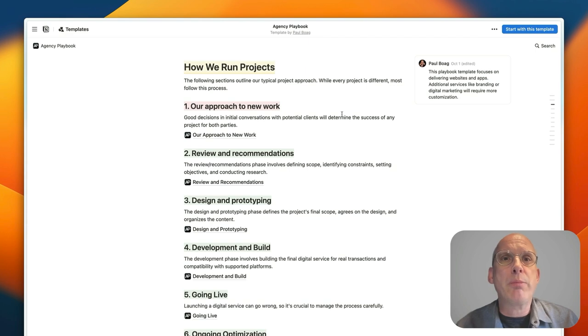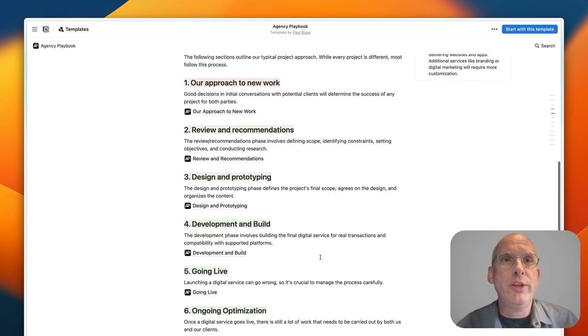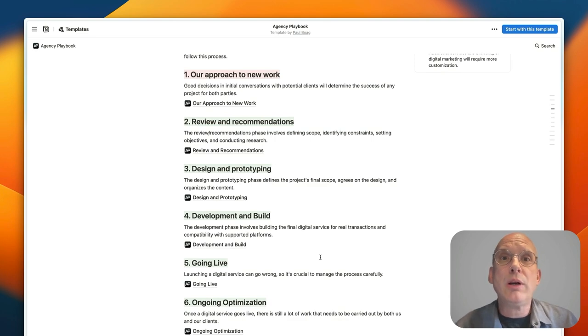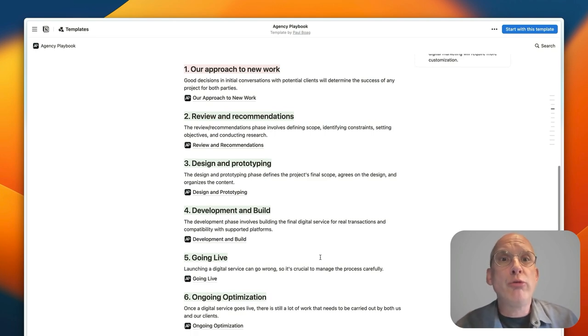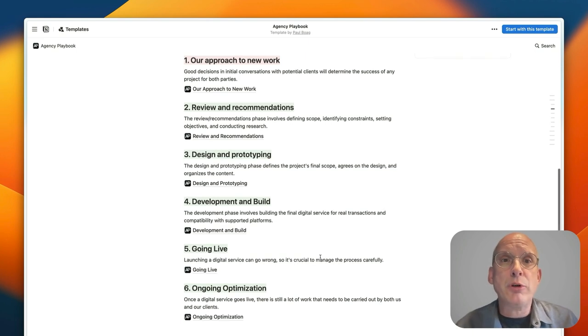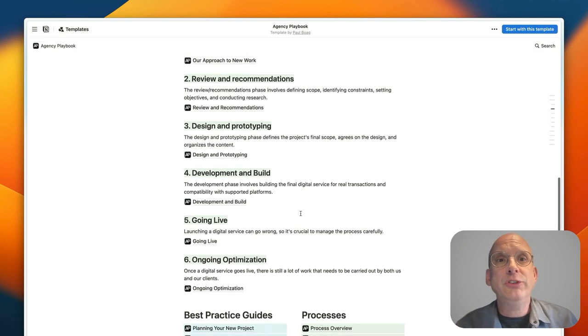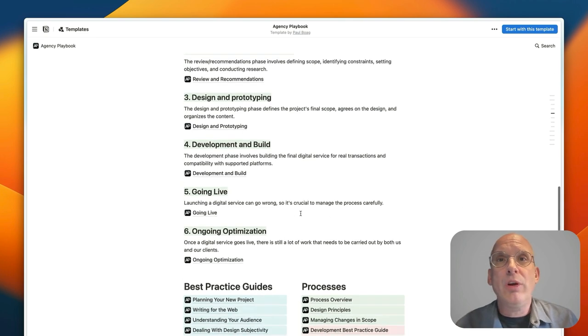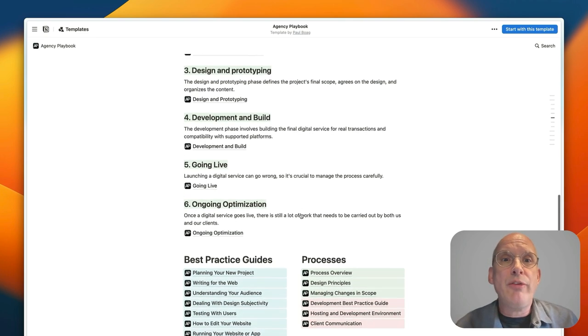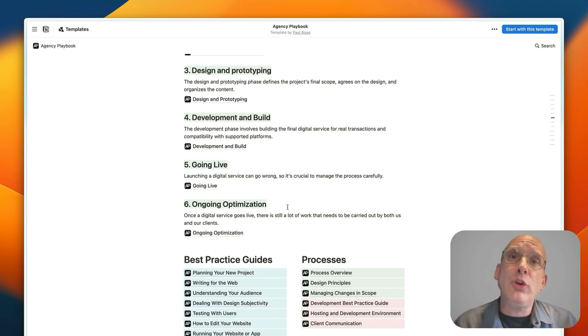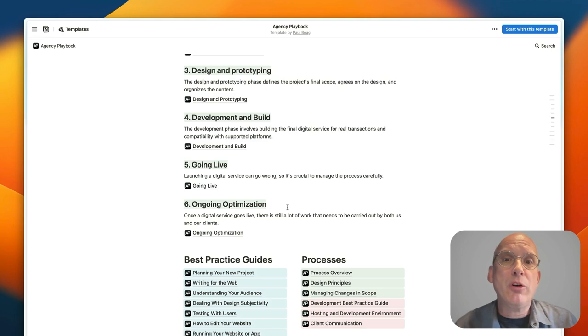So we've got how I run a project and it's broken down into these six phases: how you approach new work, how you do reviews and recommendations to understand what needs to be done in the project, the design and prototyping stage, development and build, going live, and then ongoing optimization. But that isn't all that's in the playbook.